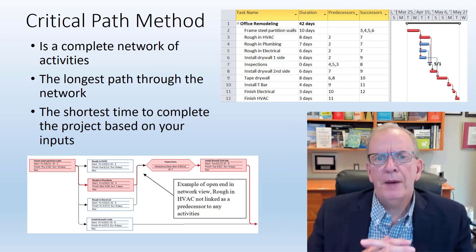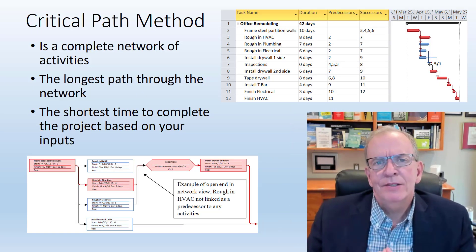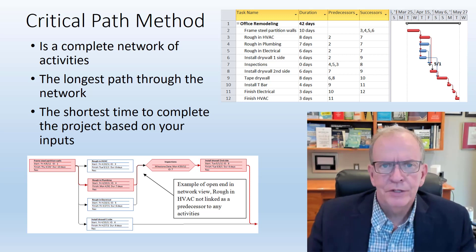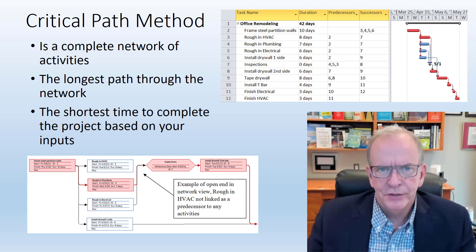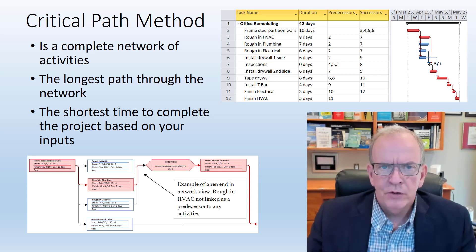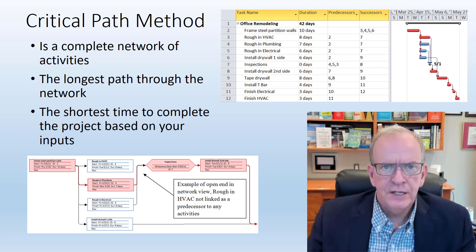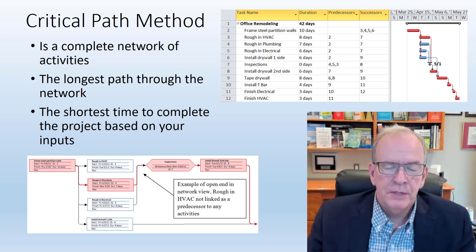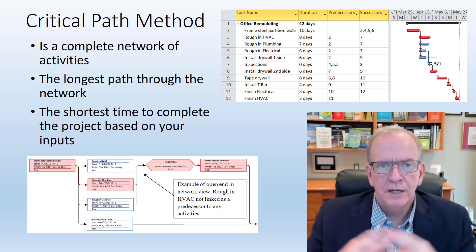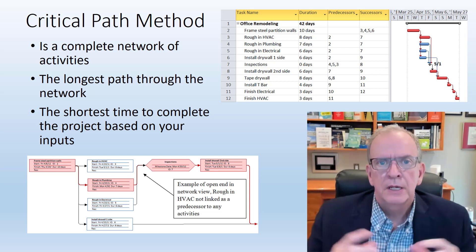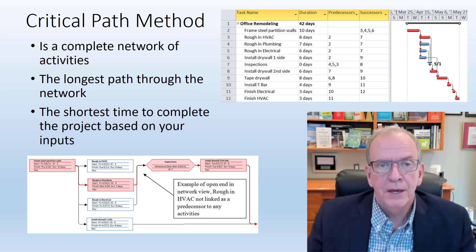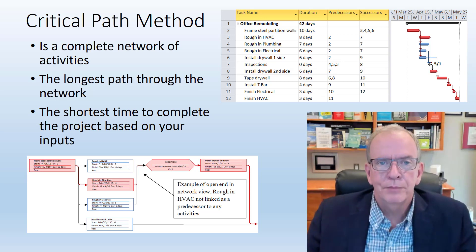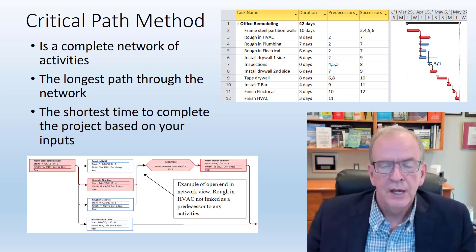The Critical Path Method has only been around since the 1950s. It was part of a military project and Remington Rand developed the Critical Path Method because they had a project with over a hundred thousand activities. How are we going to do that? We're going to need to computerize it.